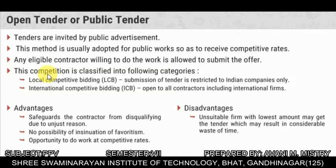Advantages of open tender: it safeguards the contractor from disqualification due to unjust reasons, no possibility of favoritism, and opportunity to do work at competitive rates. Disadvantage: an unsuitable firm with the lowest amount may get the tender, which may result in considerable waste of time.